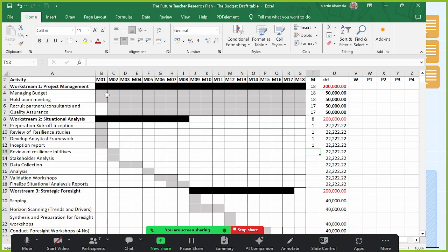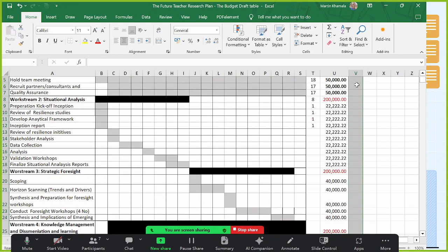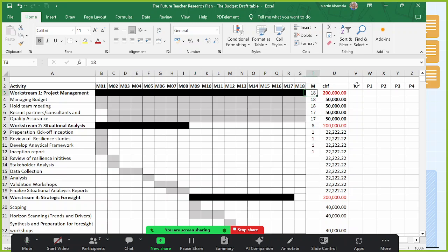To speak the truth on this is easier, because it is a defensible document to say the number of days as the number of days are. So project management is going to be 18 months actually, but it's the weighting that's going to reduce this figure and therefore reduce the total assigned to it. Let's treat the weighting on its own. This total should just equal 100%. But we'll do that next. First, let's just track the durations in an honest way.